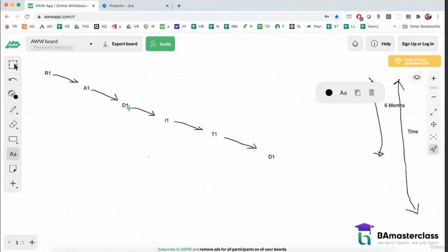You say yes. Well, in RUP as well, you don't always just say yes blindly, because you are in the design phase and the requirements for that release have been signed off. But you don't tell them no either. In RUP, there is a process known as the requirements change process. Once the requirements have been signed off for that release, and if they make a change in that requirement, you have to go through an approval process before you tell them a yes or a no. So let us see what this process is.